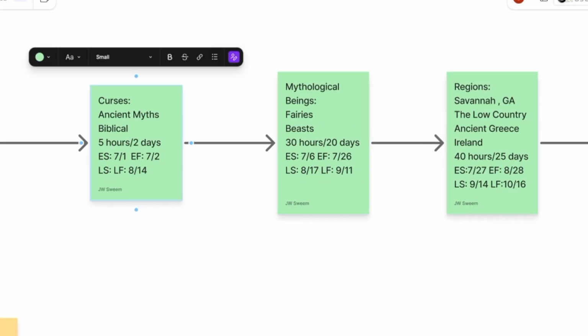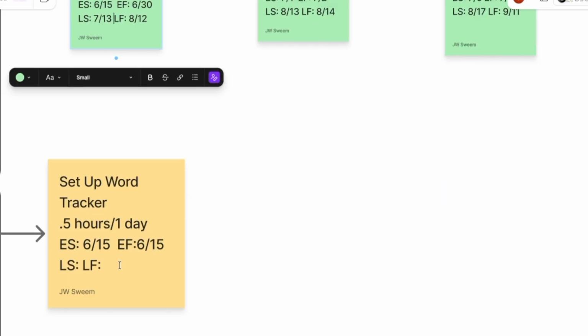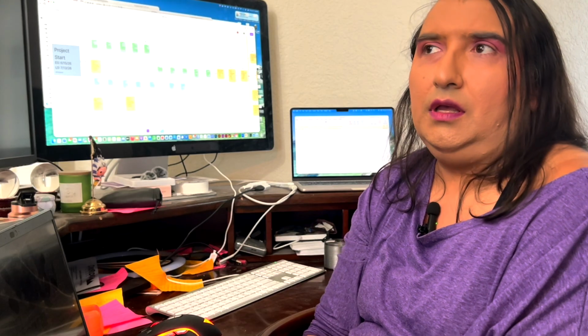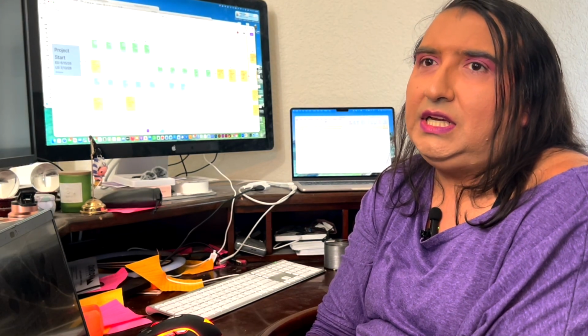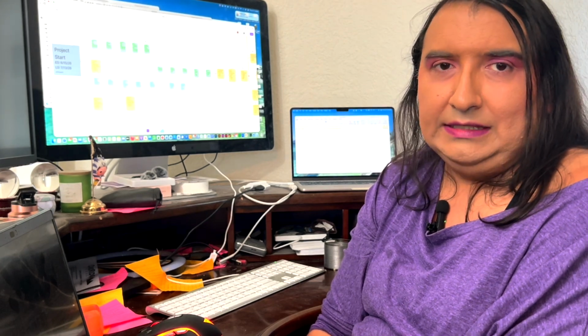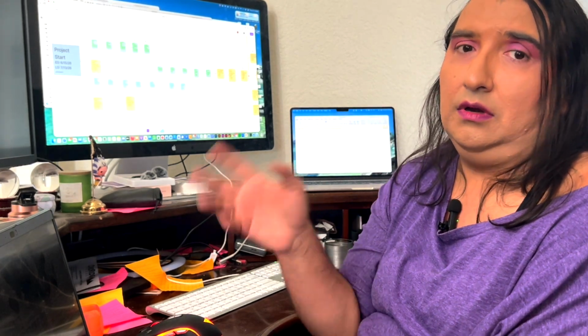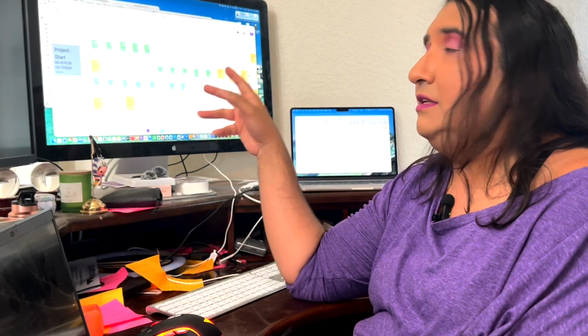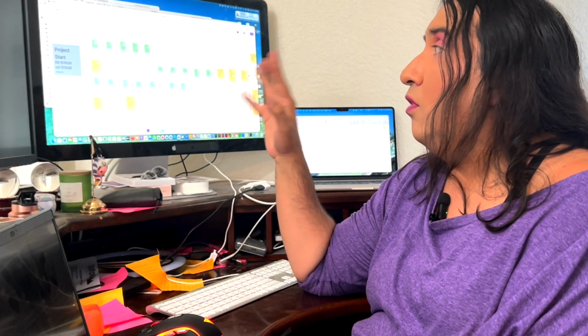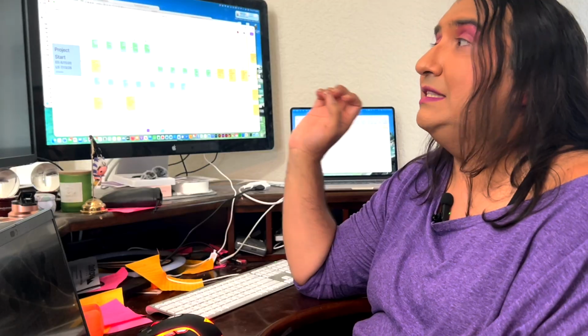Okay, so we're wrapping up here, getting close to the beginning, and then we are getting to the end, and we now have a new late start date for the project. Okay, so I got a little ambitious, and I didn't want to make you all sit through and watch me add and subtract stuff. So what I did while we were on a break is I subtracted the early finish date from the late finish date, and got what we call slack. Slack is basically the difference between that late finish date and the early finish date.